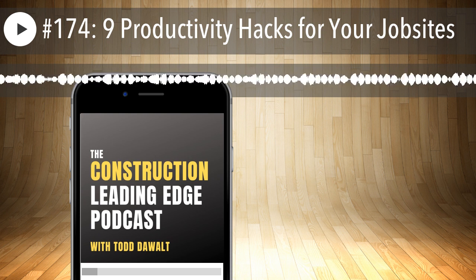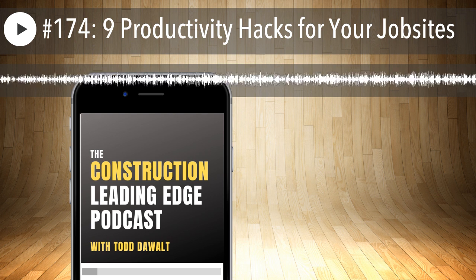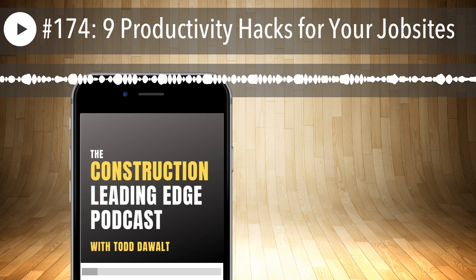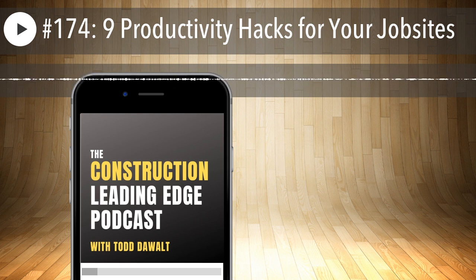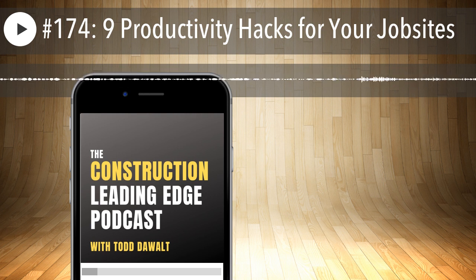So what this looks like is you say, hey, lead carpenter, we're going to talk every morning at 7:30, and then we're going to talk at 2 p.m. And here are the things that we're going to talk about. If I have a question or an issue that I want to let you know about, we're going to talk about it at one of those 2 times. And the only time that I'm going to communicate with you outside of that is if it's an emergency. Same thing for you. If you have questions, then hold them until our appointed time. We're going to talk, okay?